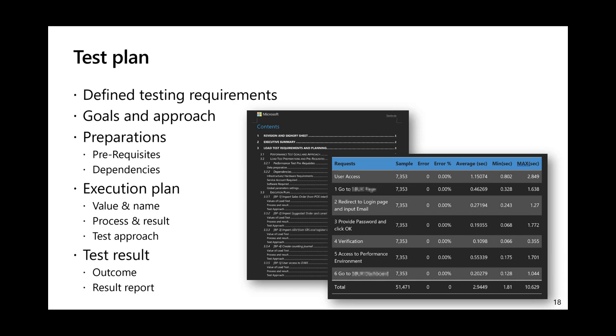Like I said, I will have a custom program to generate the sales transactions, import them to the system by DMF, and then I have set up the posting job to complete the posting on schedule. And finally, of course, we need to put down the outcome in the test result. What format is the outcome? You need to prepare the issue list. You need to prepare the result report in a Word document or PowerPoint to present to the customer: what is your finding, and what is your suggestion to resolve the issue in the close-down meeting?